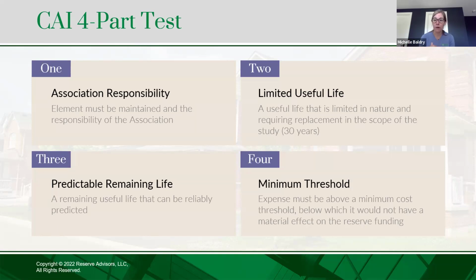In Virginia, you are required to have a reserve study conducted every 5 years. In Maryland, also required to have a reserve study every 5 years. There is now a legal requirement that the developer has to prepare a reserve study prior to transition. So any developing community that is turning over from developer control to board control, they should be provided a reserve study that the developer has completed. It has to be done pretty close to turnover.